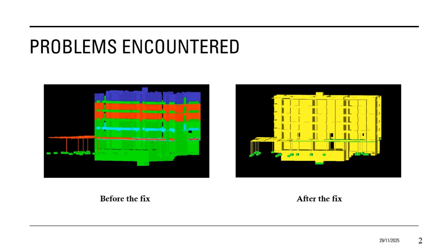Construction activities such as formwork placement in red and concreting in green are configured so that their elements retain their phase color upon task completion, instead of reverting to a neutral state or the model's original color.